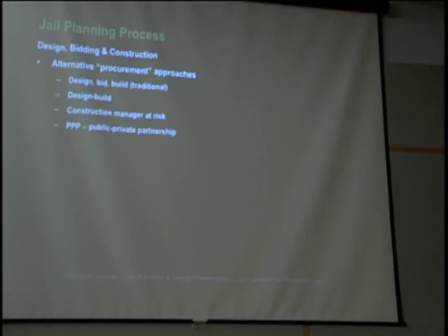And the last one that I've mentioned is one that California is trying, and I know you've had some efforts here and maybe some successful projects too in Washington, called public-private partnerships, where you have a developer who actually probably provides the land, but puts up the financing, builds the building, probably leases it to you, but maybe sells it back to you.